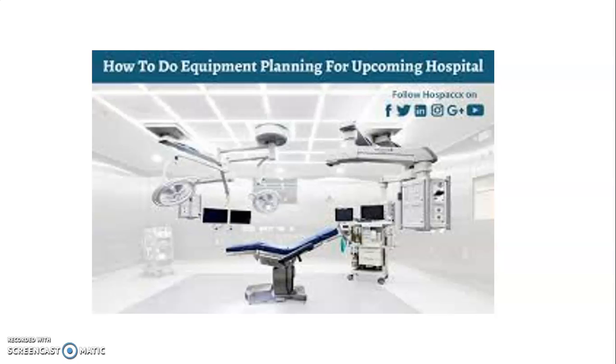So you need to do a room by room equipment list. That has to be compiled and reviewed by the admin, medical and department staff. The very first one is built-in equipment. When we are discussing built-in equipment, we are discussing the counters and cabinets in laboratory, pharmacy and other parts of hospitals, elevators, incinerators, coolers, fixed sterilizing equipment. They are usually included in the construction contract, and the planning of this equipment is the architect's responsibility.